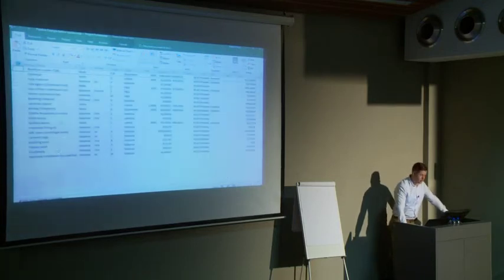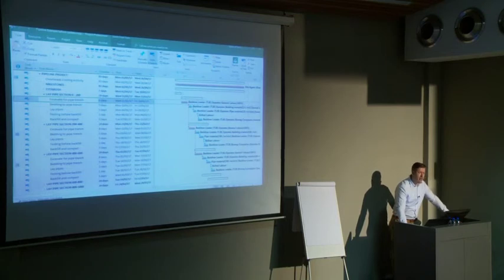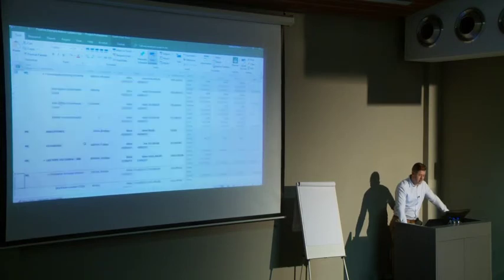And that I think you can all do. The assignment is extremely easy because you simply double click on an activity, and when I go to the resources tab, I'll just assign a TLB, 1 operator, and 2 laborers to my activity. Once that's done, it spreads the cost over those activities. And then the view that I spoke about that's very important is the task usage view. Task usage spreads whatever values you want to see over time.